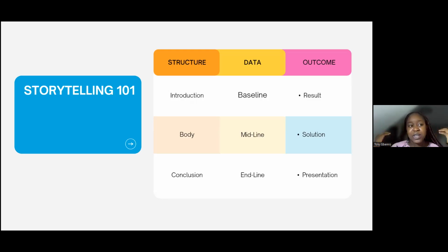Because I factored in budgeting for the teachers. I forgot to even budget for my guests. I just said, we are training 40 people, 40, and I forgot to budget for my guests. I forgot to budget for the photographers. I'm paying the photographer, she used her own money to eat. So there's always the need to learn from these things.